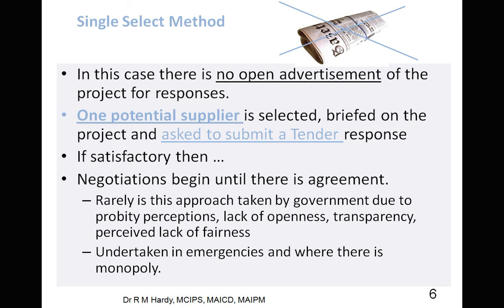So it's not commonly used for houses, because the level of administration on the part of the person running the tender becomes very high. So if you suddenly have to assess 27 tenders rather than 3, then you've lost the fees. So it's got to be worthwhile for an open tender.